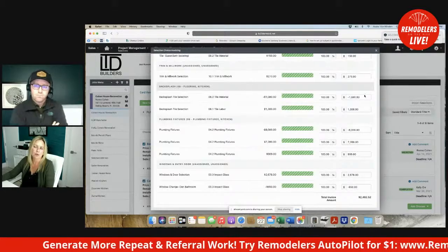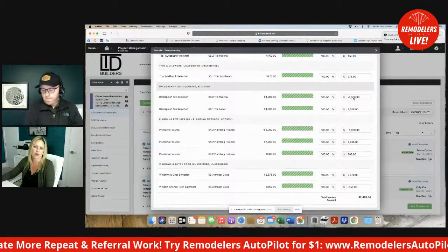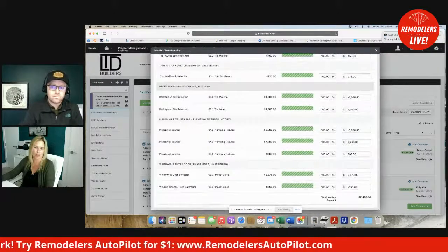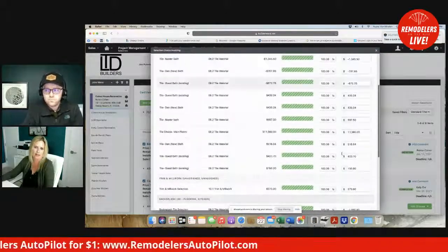It is, because if you put the negative in the quantity, it will just remove it from this portion, and then this number is wrong. So that took me a while to figure out, and it's a very simple solution.